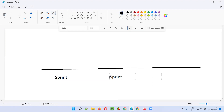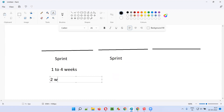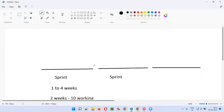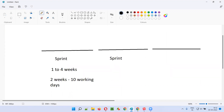Each sprint has a time-boxed duration that varies from project to project — typically one to four weeks. Ideally, most projects use a duration of two weeks, which is nothing but 10 working days. Whatever tasks are assigned to the sprint at the beginning need to be completed by the end of the sprint within those 10 working days.